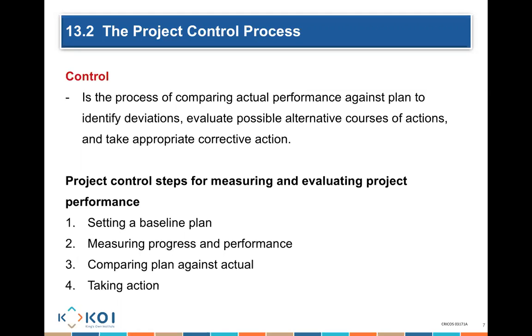How am I performing? I see then I have a comparison between my plan and my actual. My plan said 50, my actual said 100. So then I know I am $50 over budget. So what do I do then? I have to take corrective actions to see what the issue is and to rectify that particular problem. That's really what I need to bear in mind and think about in that perspective.